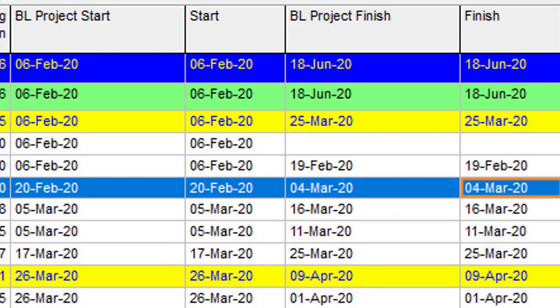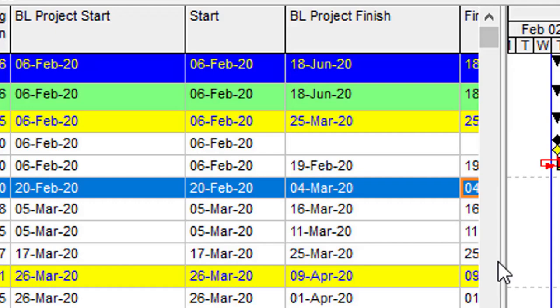What is happening at this moment is, because we have just created these baselines and taken a snapshot of our initial plan, there is no variance at the moment because work has not started. That's exactly why your baseline at this moment synchronizes with the initial plan that you have, which is what we have illustrated here. Now that we have created the baselines, it simply means that to a large extent we're done with our planning. Next, we shall go into executing.